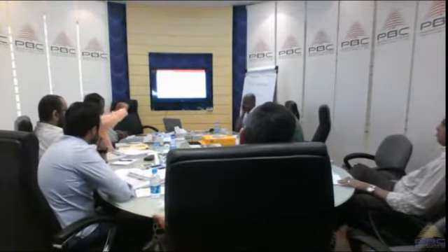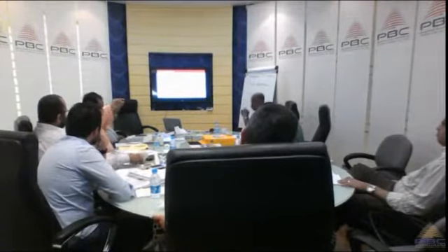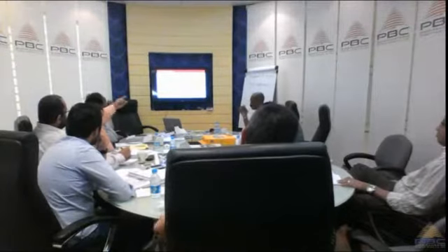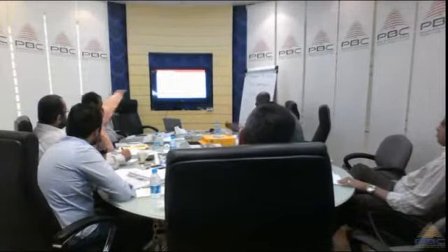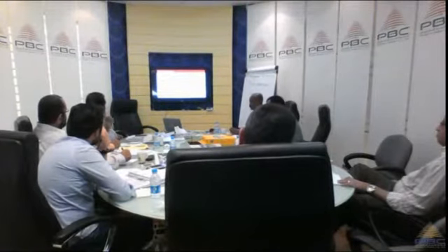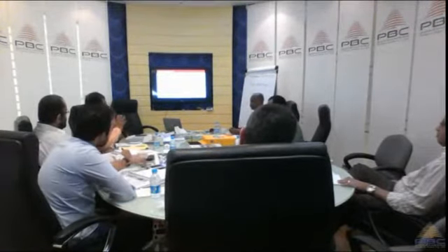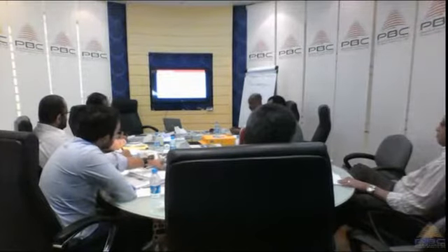When we establish these activities, you will find some activities are critical activities. The float is zero. The path passing through these critical activities, we call it the critical path. Okay. So we have the baseline of the shutdown schedule. So when we come to execution, we have to monitor the schedule.